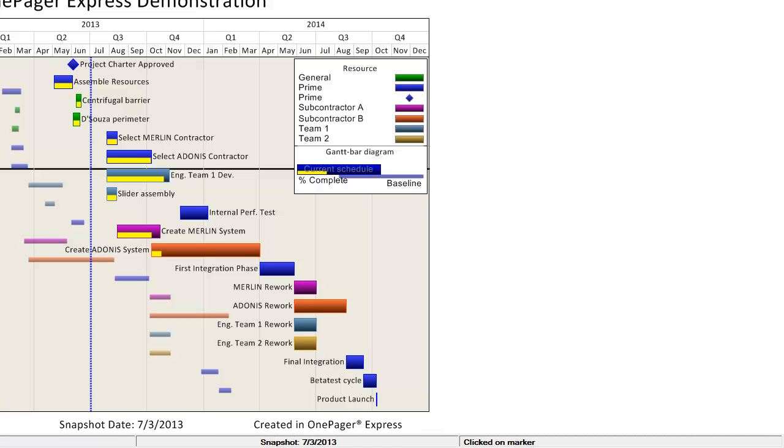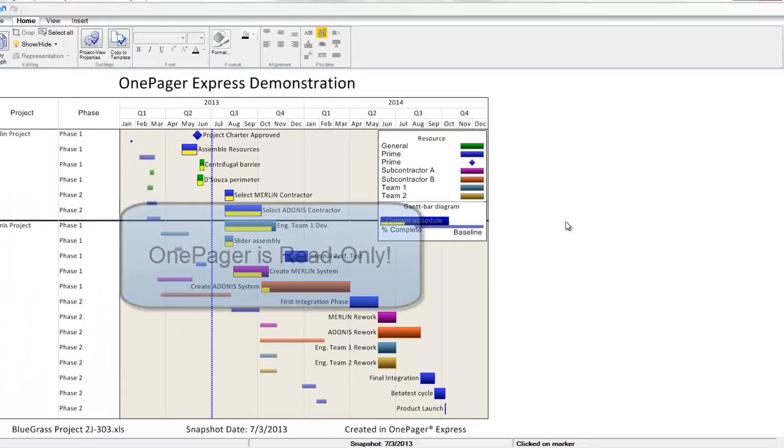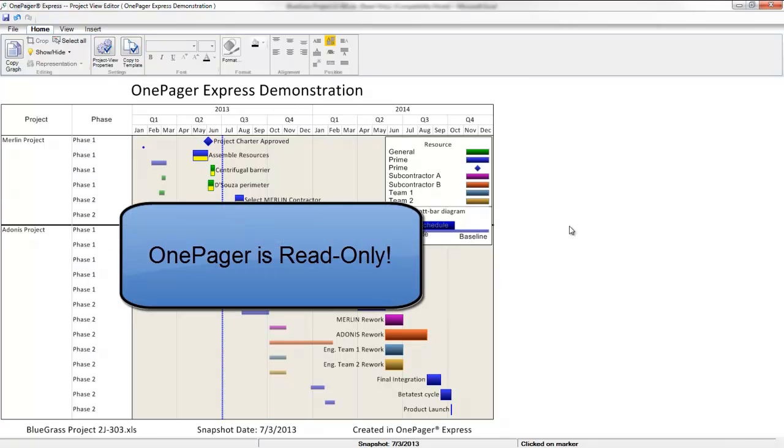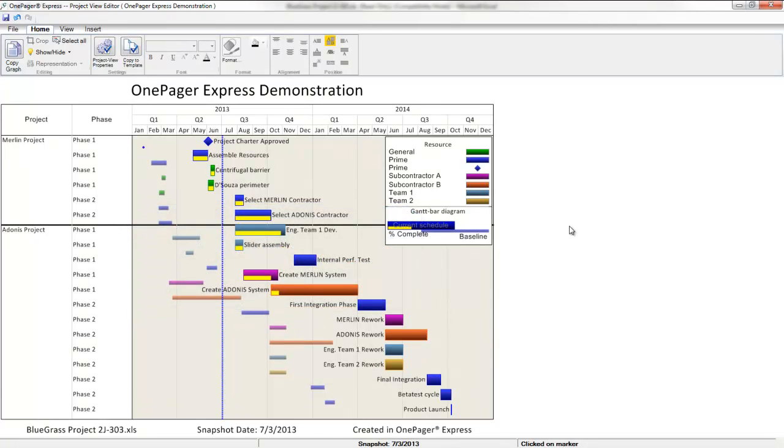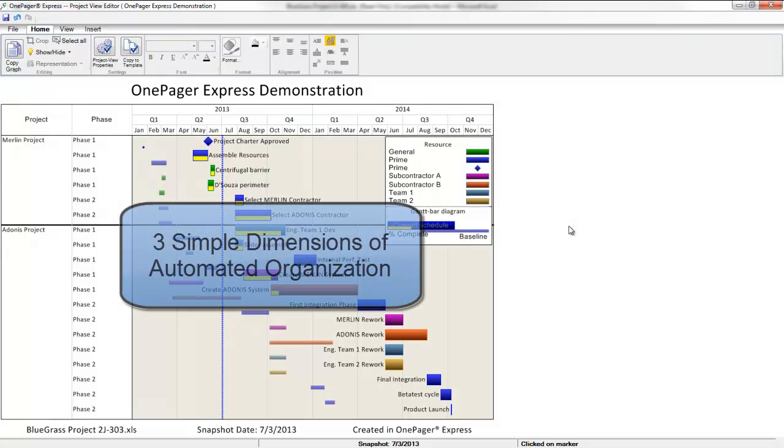If you pull your data in and something is looking off, you would go back to your source document, make a change there, and then ask OnePager for a real-time update. It's important to note that OnePager is read-only, so you never have to worry about OnePager backwards populating anything into or corrupting your source document. This also ensures you have one source of truth for your initiatives. Now let's get into the features of the OnePager application.